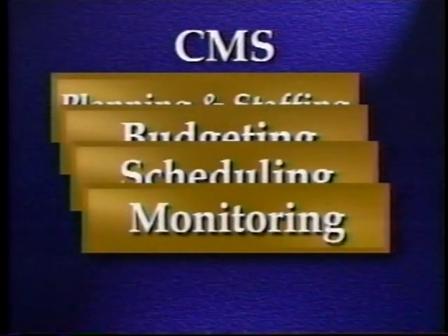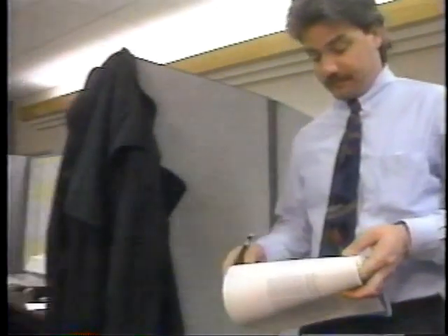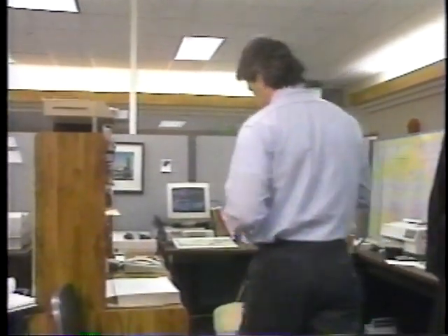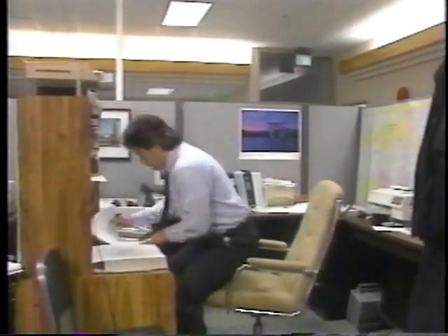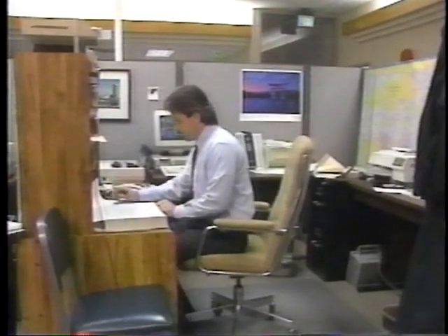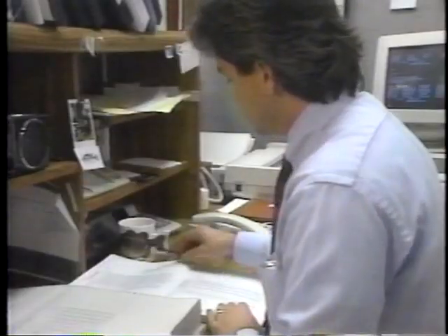In the monitoring element, the actual man-hours used are compared with those planned and with the contractor's progress to allow engineers to assess their effectiveness in utilizing their employees. The monitoring procedure compares actual man-hours used with contractors' progress.